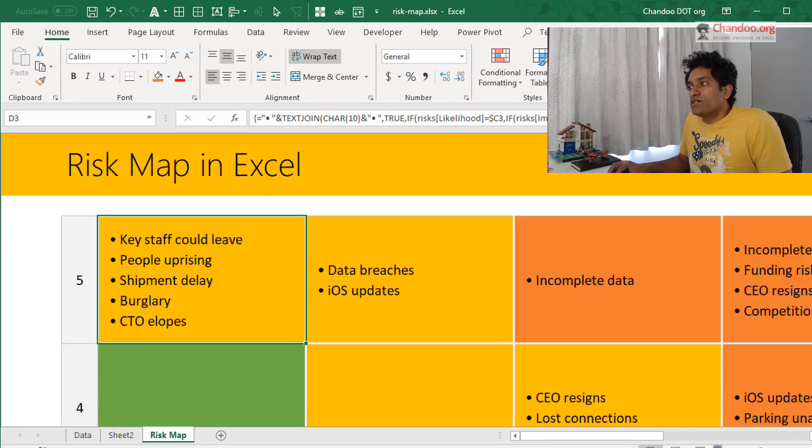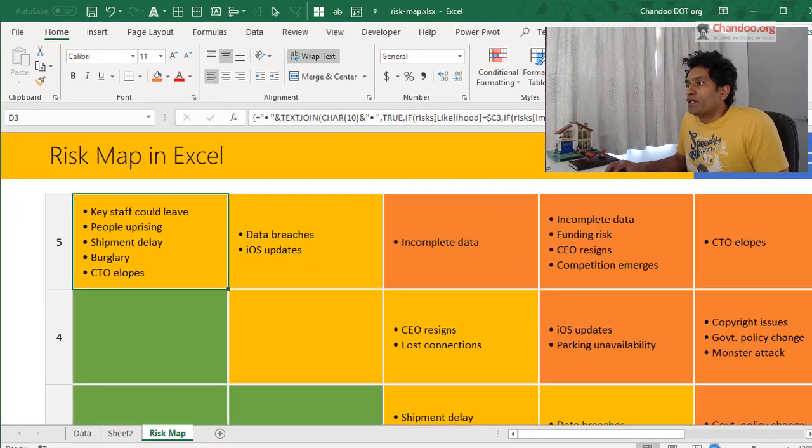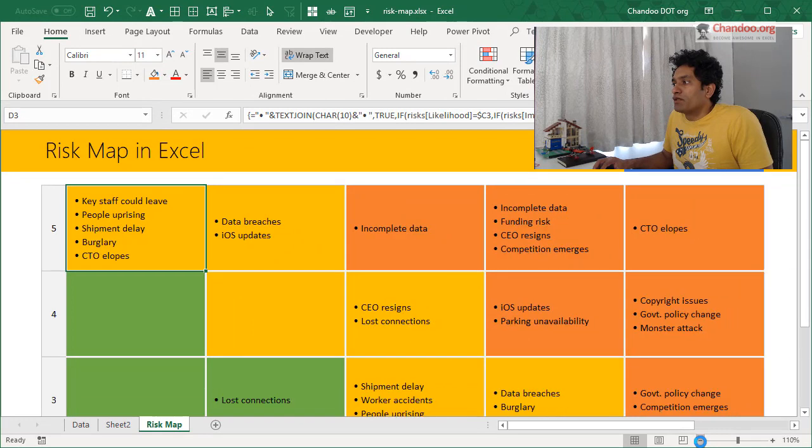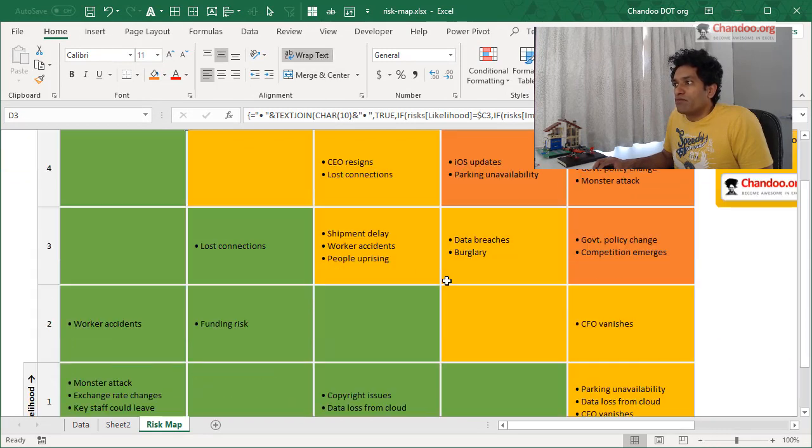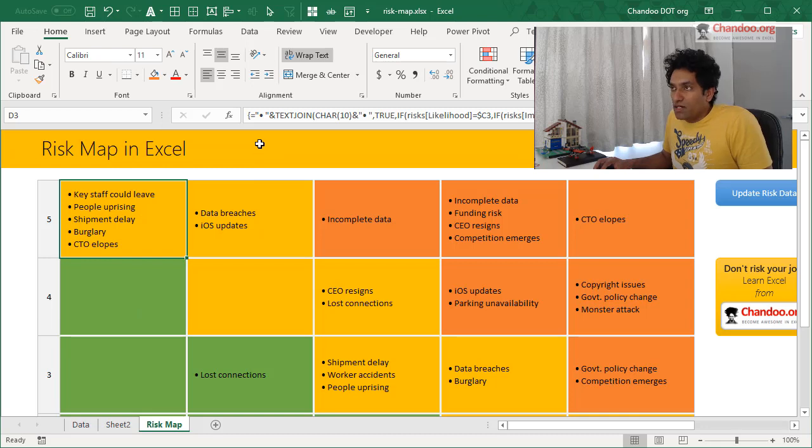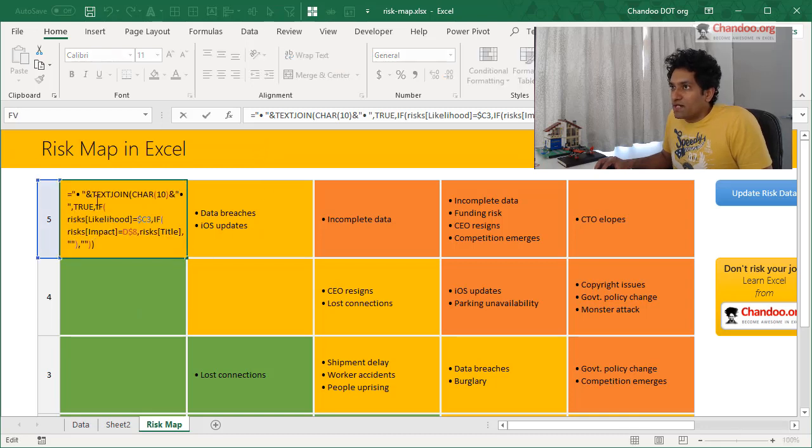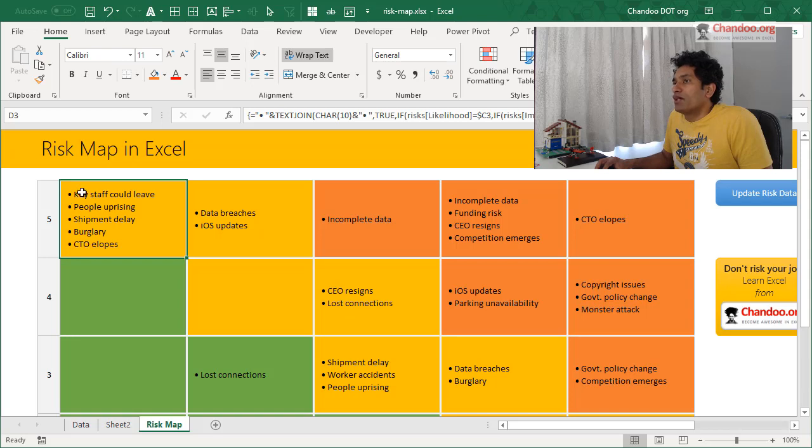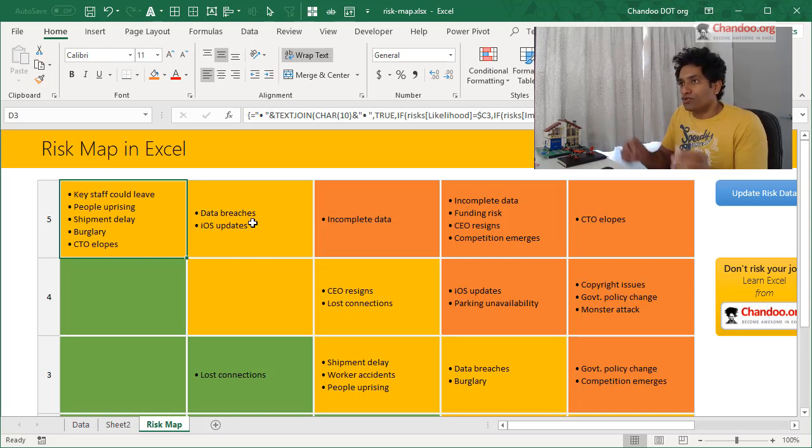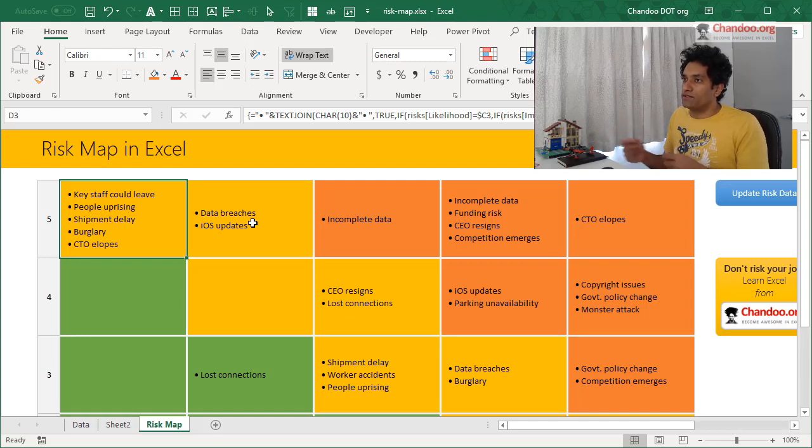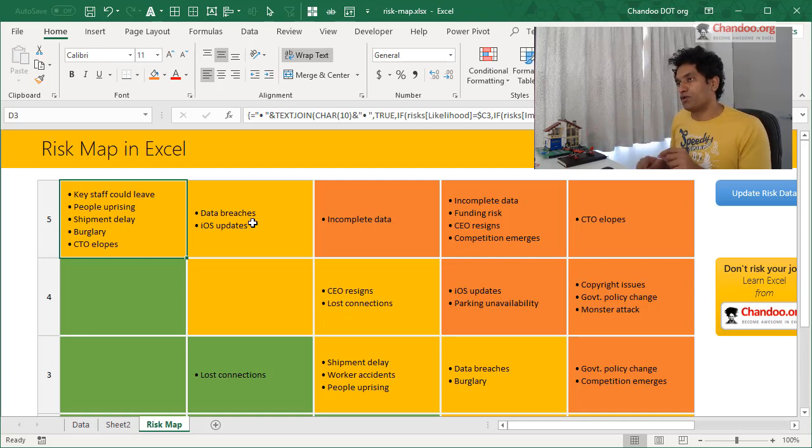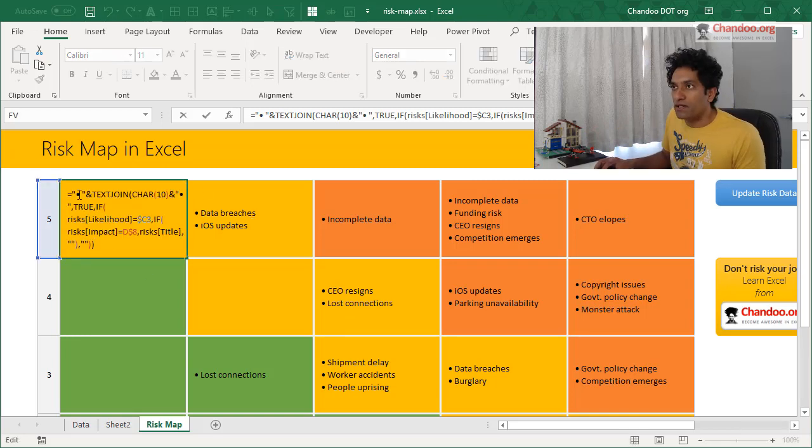Once those values are there, all we have to do is show them in the matrix by applying word wrap everywhere. And because of the way we are doing this, if you observed earlier, the first word will not have a bullet point because the delimiter will only appear between each of the TEXTJOIN result return values. So if there are two values, then the bullet point will appear in middle, but not between the first one. So that's why I have appending a bullet point at the start.